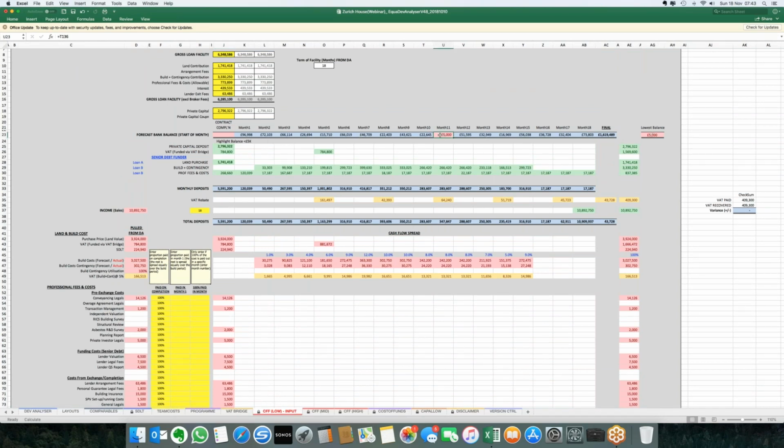I mean, we can change this, but we target a minimum bank balance at any one point in this illustration at £5,000. So you can see in month 11 here, it goes to that threshold. And then the sheet quite cleverly works out, in order to sustain that minimum position, what's the extra cash that we need to get to that point? And that's the bit that the senior debt lenders do not consider.